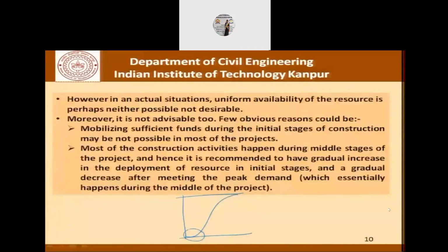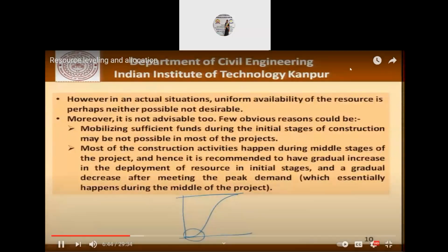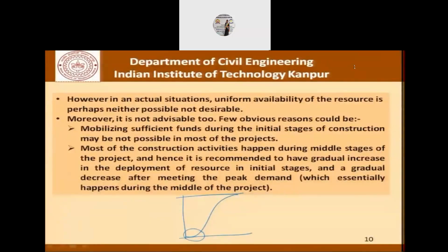In the initial part, it's not only the mobilization of funds, but also the learning experience and availability of front. All these kinds of issues make it very difficult to achieve progress which can be sustained all the time. But having done that initial learning, it is much easier to gradually increase the resources, reach a peak level, and then taper it off.